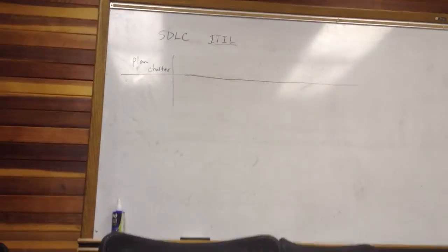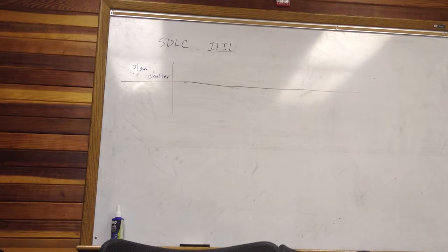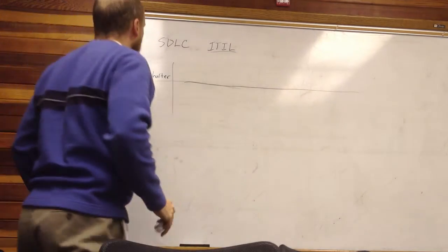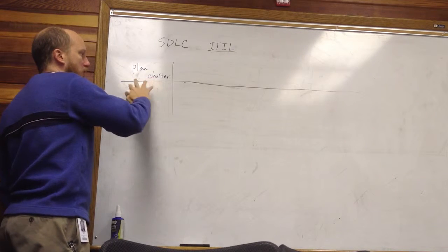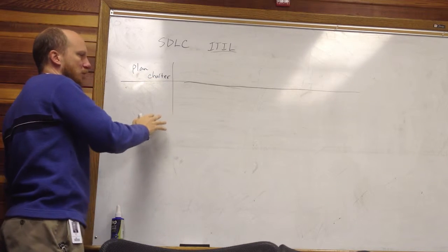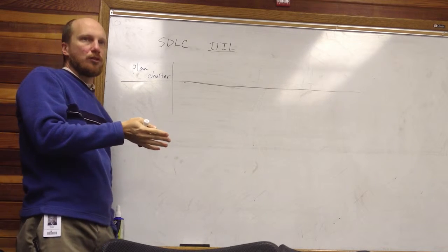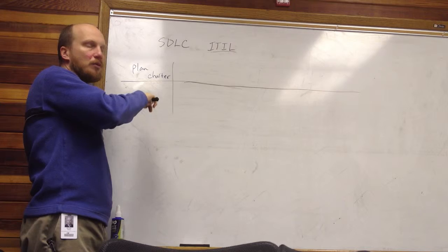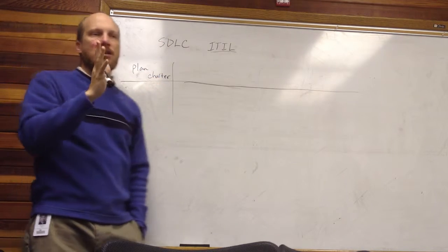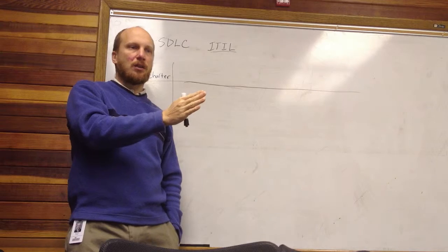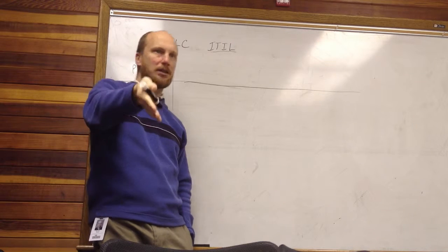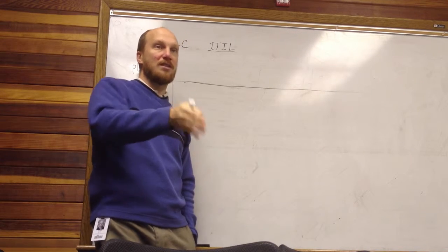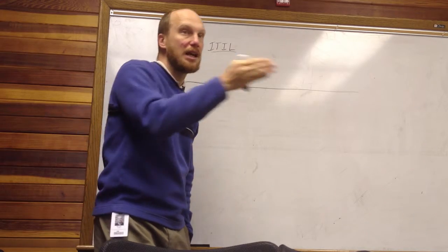So now we're down at the project level, and we're going to get into software development of the project. So we start off with a plan or a charter. You get different terminology here depending on your system. PMP will refer to a charter. I think Prince 2 refers to a charter. It's basically saying, we're going to do this, and this group has the authority to do it, and has these resources and this expected timetable, and so on.